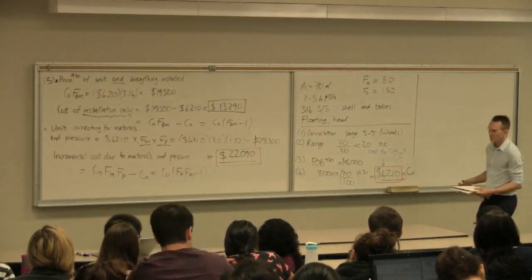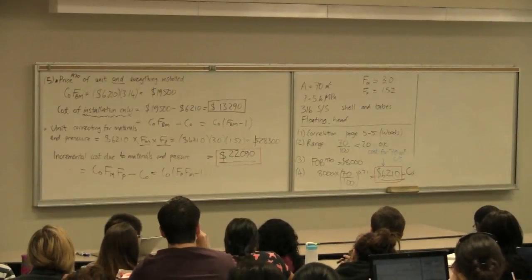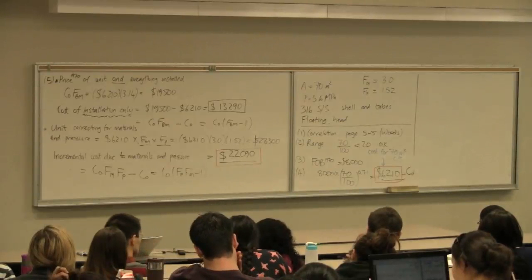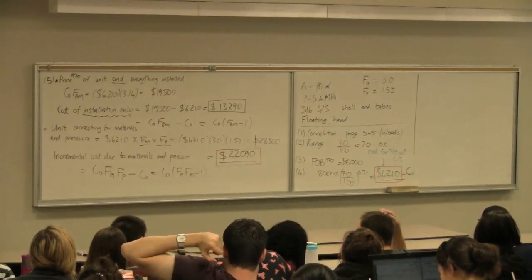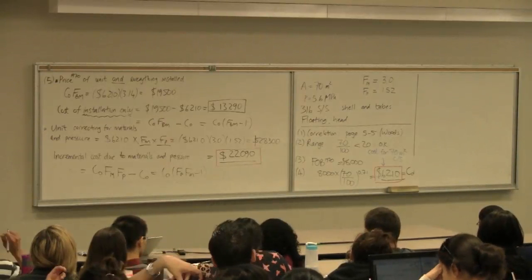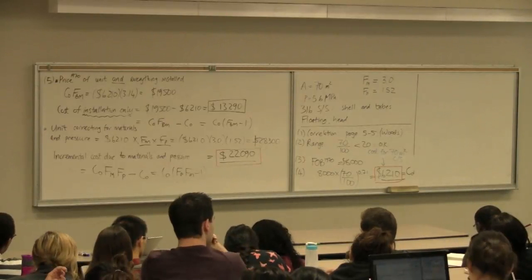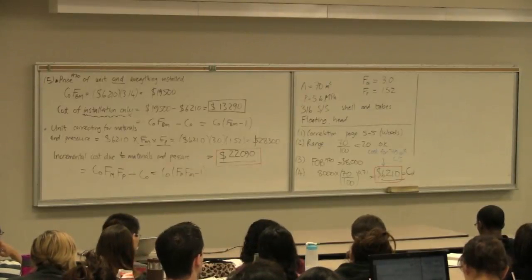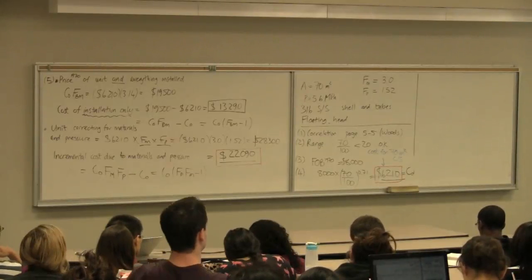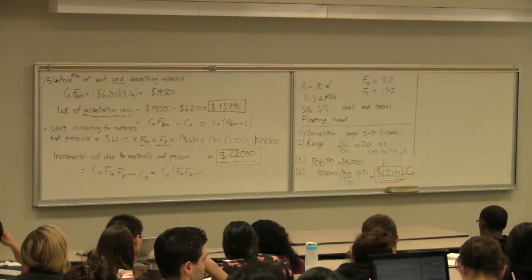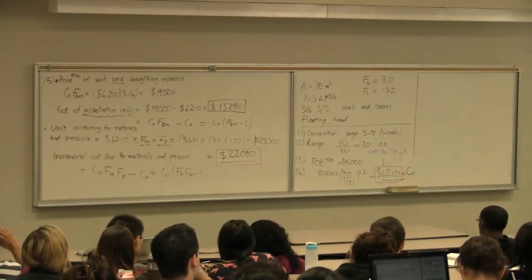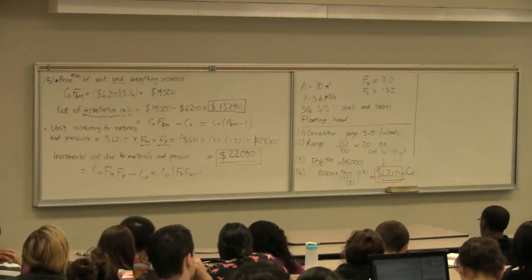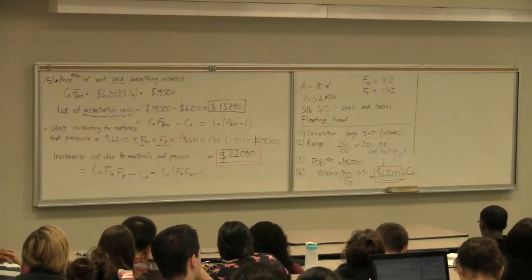The thinking is the following. The bare module cost includes everything, including piping, instrumentation, and all the setup for the unit. But we can look back at some tables and ask, of that bare module cost, how much is just due to the piping itself? Because inside the bare module, we would have normally put in carbon steel. But if the heat exchanger is required to be made from 316, there's clearly going to be a requirement that the piping inside the bare module is also 316. There's a reason, probably for corrosion or sanitary purposes, or whatever the case might be, that we've chosen to manufacture that heat exchanger from 316 rather than carbon steel. As a result, the piping that goes inside that 3 meter radius bare module likely also needs to be made from 316 stainless steel.